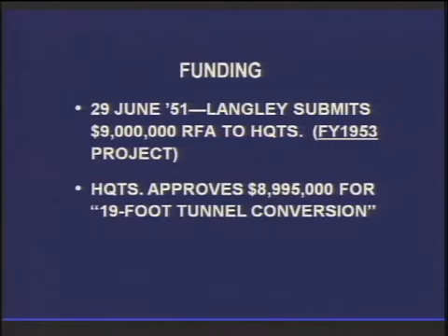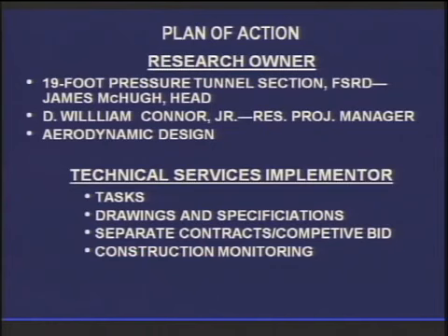Headquarters approves this baby. They, for some reason, knocked $5,000 off of the request. Now, all I can figure is that they were trying to make some total number come out even. So instead of $9 million, they say, hey, fellas, you can have $8,995,000. Langley's happy. Sounds great. How are we going to do this job?